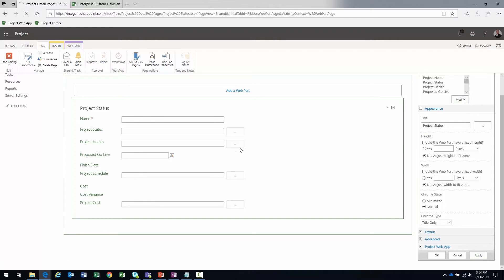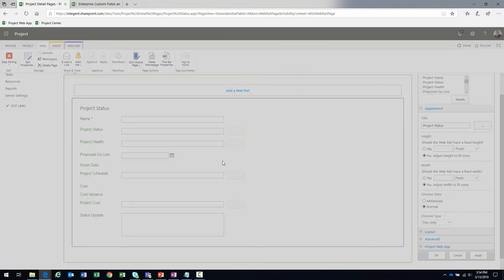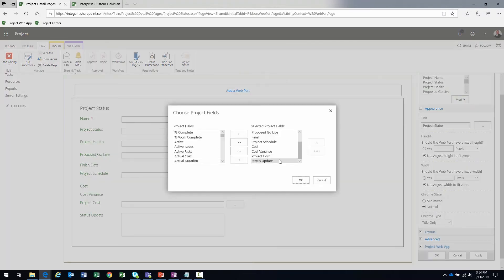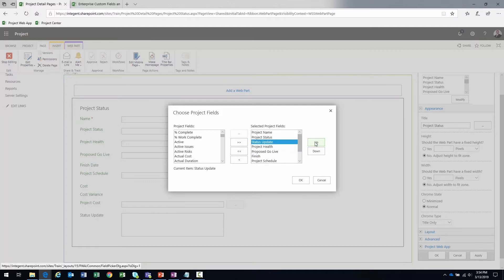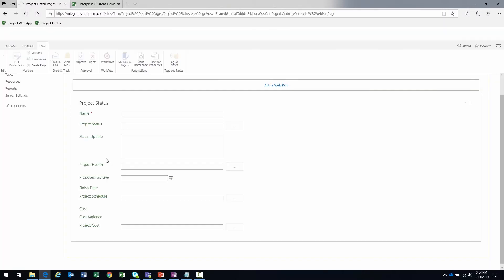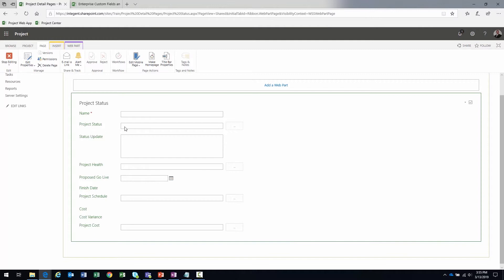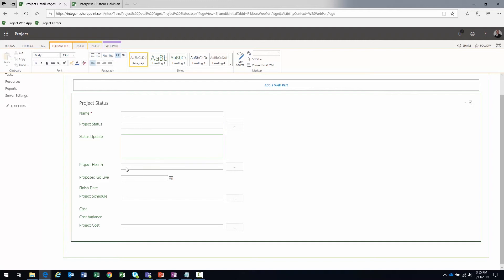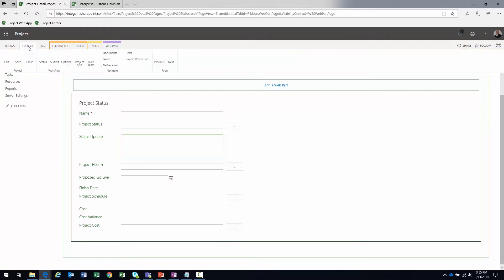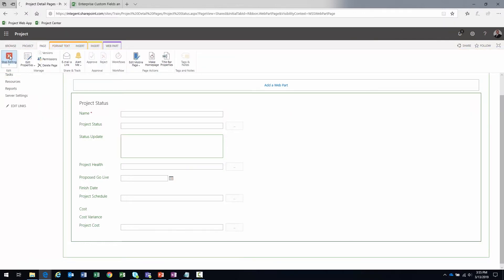I'll click 'Apply,' then I'm going to move the Status Update field up using the up/down buttons, placing it right under the Status field. Click 'OK.' This page now captures: project name, what status phase we're in, the status update narrative, health KPIs, manually set schedule and cost KPIs, and the data points behind those KPIs. Let's click 'Stop Editing.'